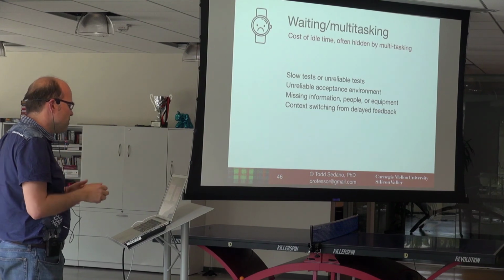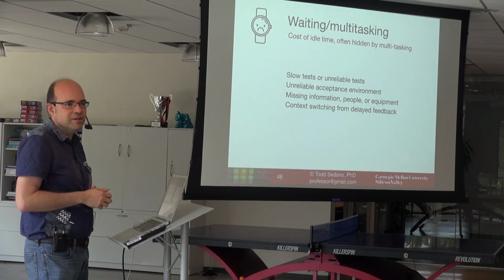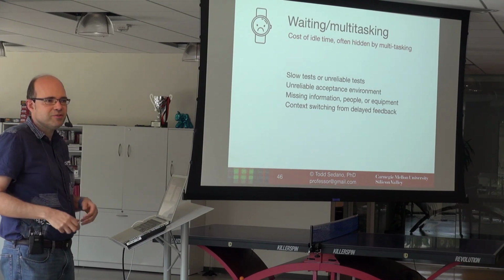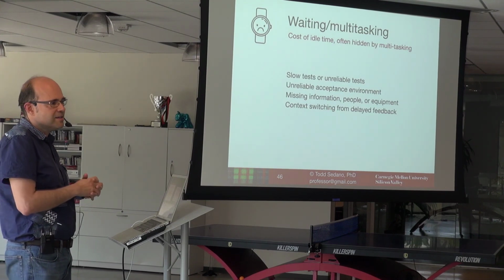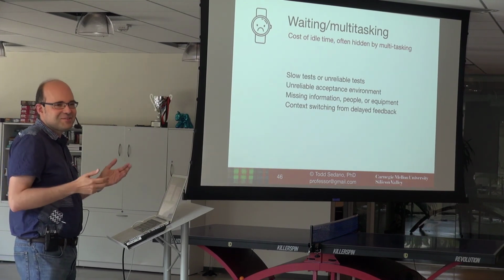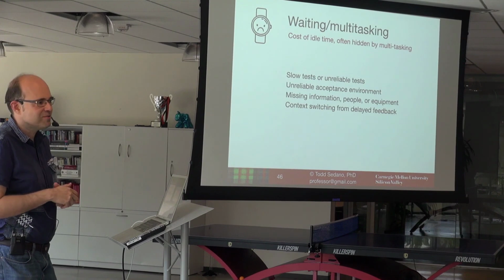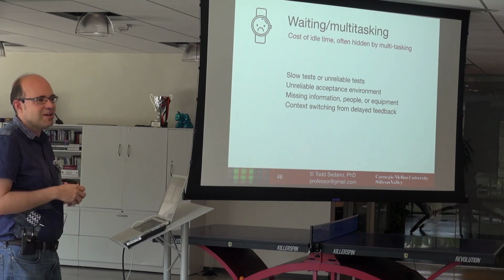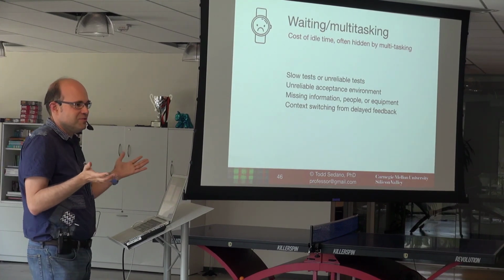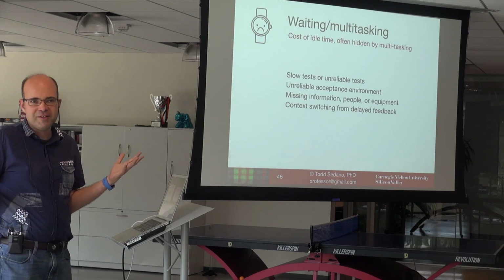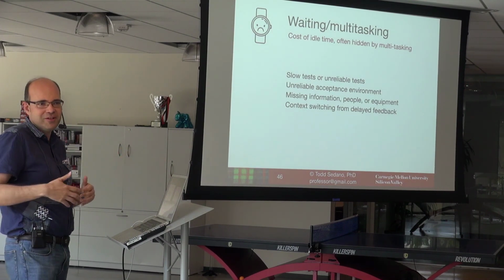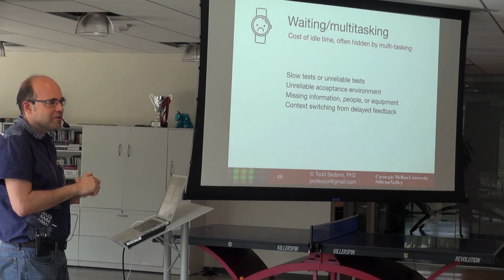And I felt this pain. You're working on a story, you think you're done, you hit finish, you push it off to CI, and it takes 45 minutes for that to finish. So then the question is, 45 minutes later, so what do I do? Do I wait 45 minutes? No, I'm going to be efficient. I'm going to start the next story in the backlog with my pair.